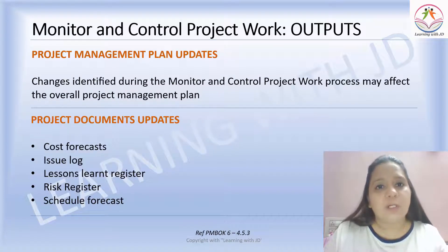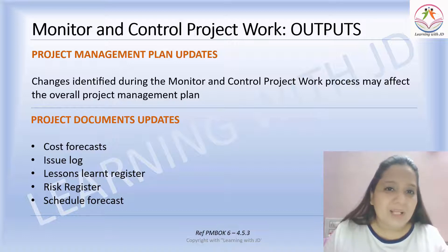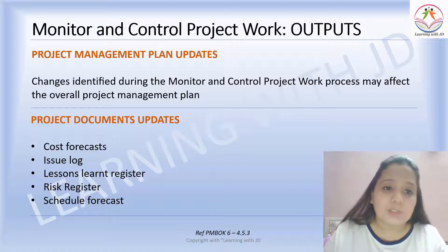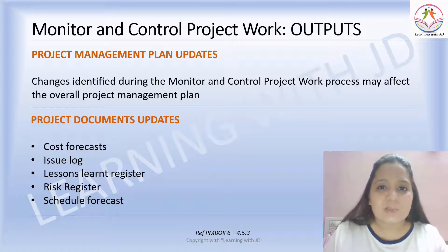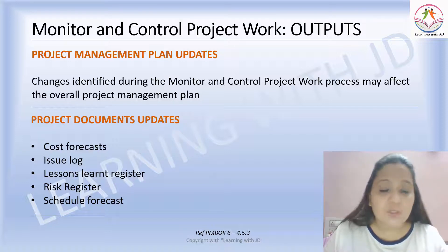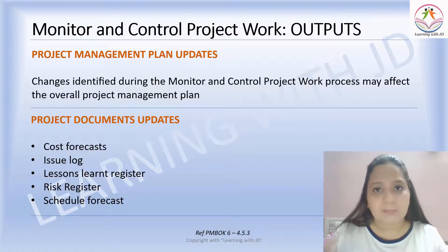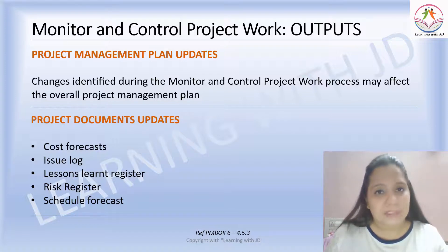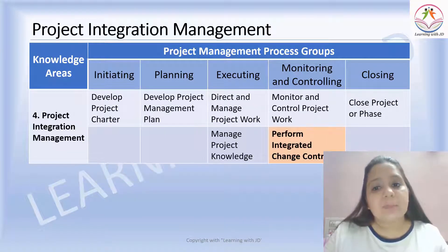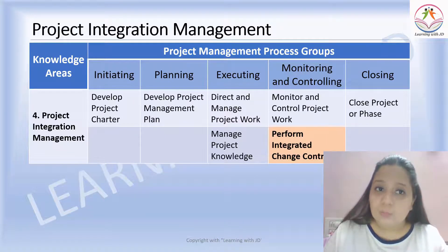The outputs of monitor and control project work include project management plan updates and project document updates. Changes identified during monitor and control project work may affect the overall project management plan. Project documents that may be updated include cost forecast, issue log, lessons learned register, risk register, and schedule forecast. That's about the monitor and control project work process.